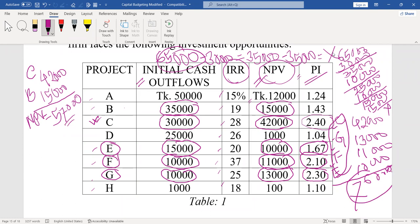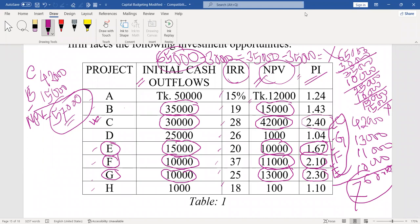So using profitability index, we can select more projects within the limited budget of 65,000 and achieve a higher total NPV of 76,000 compared to only 57,000 when using NPV alone. This is why for project managers, profitability index is better than NPV for capital rationing — for selecting more projects. A project manager can use payback period, average rate of return, NPV, IRR, and profitability index, but for capital rationing, profitability index is clearly better than NPV.